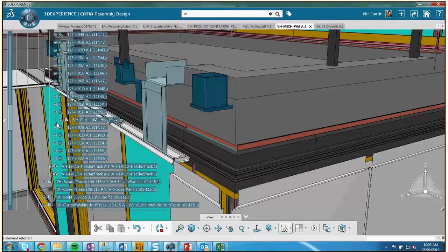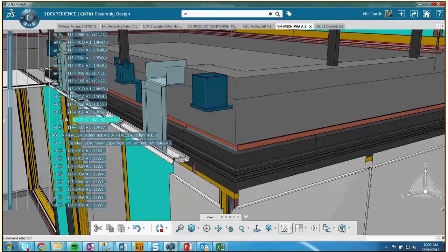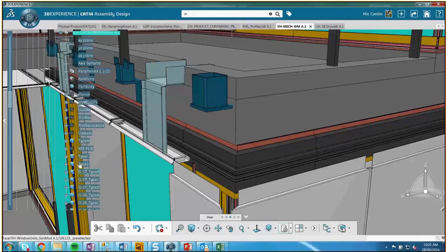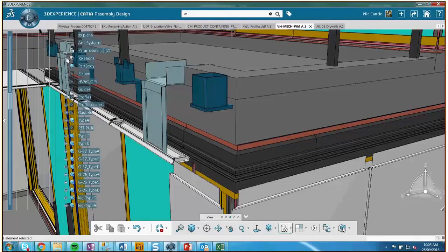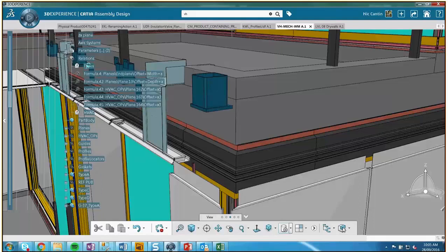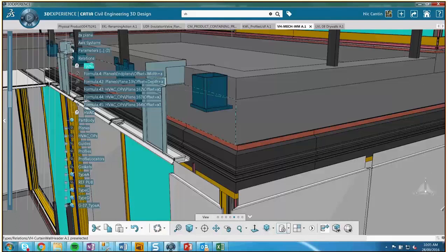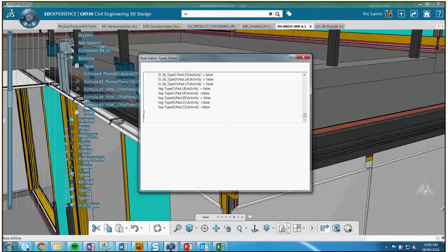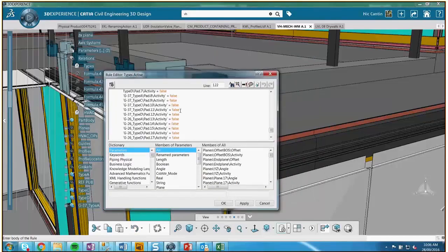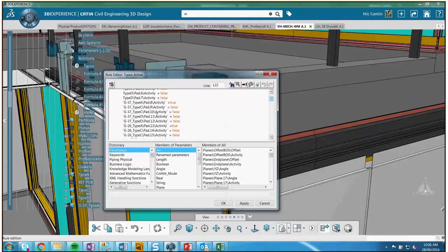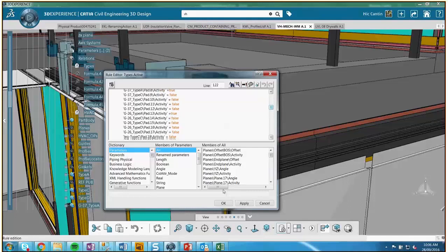And then the mechanical or MEP side is directly with the subcontractors. It's typically Tallwood, we were hired by the owner because we convinced them to do this as an IPD-ish type of structure. It was still design, bid, build, but we really did an integrated process where we were in design, providing commentary, but we always knew we were going to take this to construction. What I like to say is we reduce the barrier of entry with regards to technology by not requiring all the trades to do this themselves. They could just say, are you willing to sit with us and work with us, and we can give you the outputs that you need to build. And that's how we took it on that job.